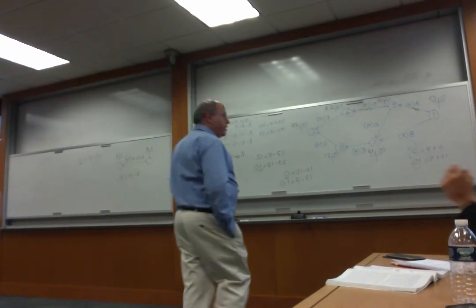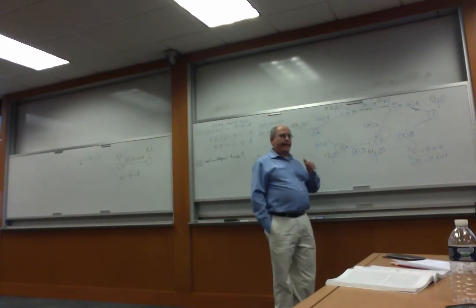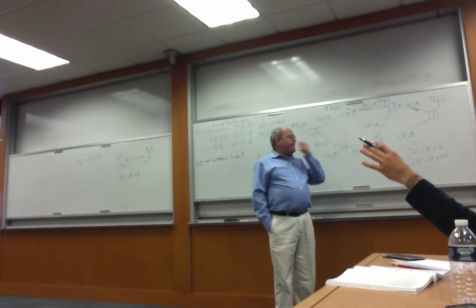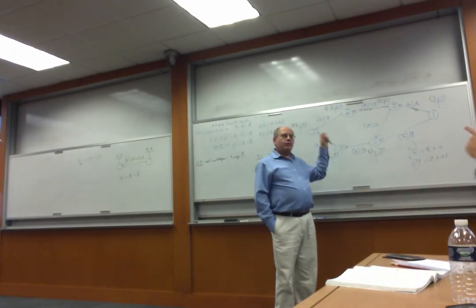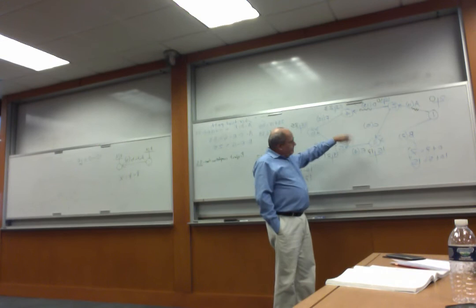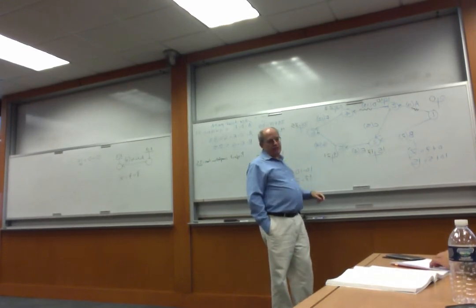In a nutshell, walking forward basically identifies how long the project will take. And going then backwards verifies what the critical path is. You verify the critical path, and that the calculations are also correct.